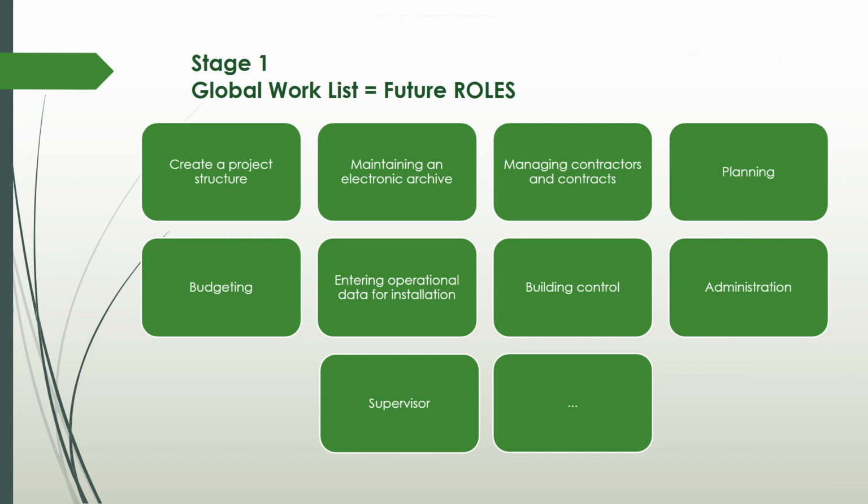Within the sections, we create construction blocks and tasks for contractors. We fill tasks with types of work, unit of measurement, and indicate their main resource. This is a separate type of work that is done by individual employees.